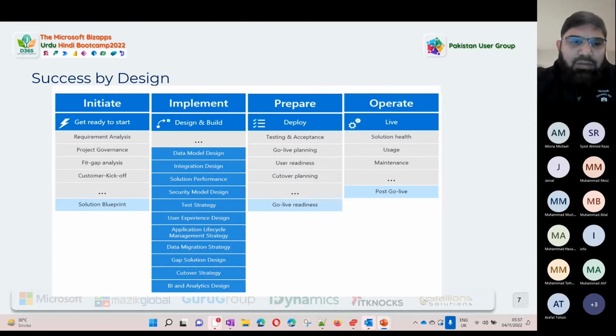How do we monitor the system? Initially, during the first few weeks after go live, up to 2 months for example, you can have an early live support as a partner giving to customers. As part of that early live support, you have more team members working on a project. You have monitoring implemented. You have a mechanism where bugs or tickets are logged and operated in a timely fashion. So these are the strategies where the solution architect gets involved and produces a series of deliverables.